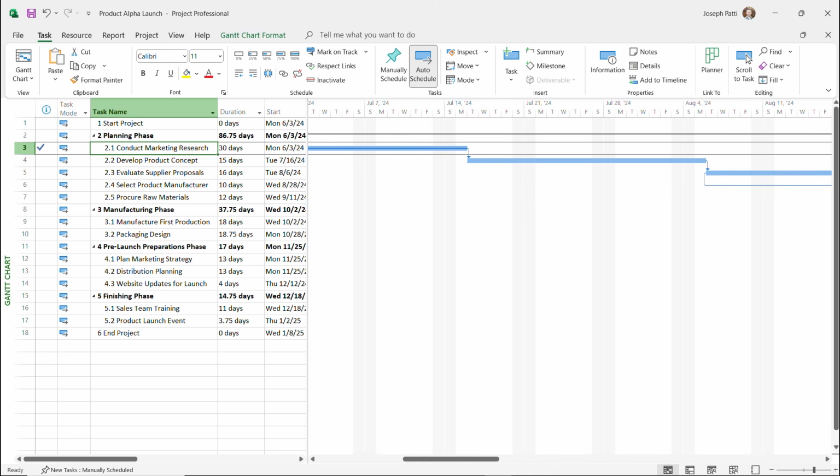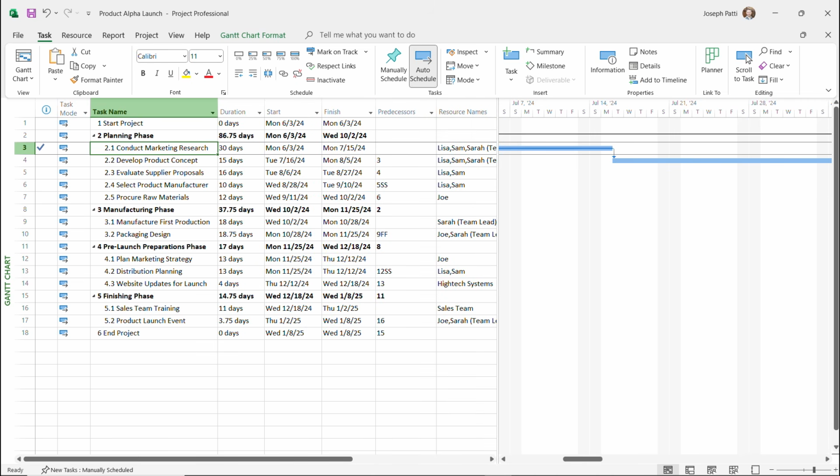But let's say we did get a little bit completed on 2.2 task. So I'll just move this back over, click on 2.2 task, and let's say we're about 50% done with this one. Now, once again, we don't have a way of telling if it's 100% unless we see that check mark only. There's no indicator as to what percentage completed this is, and the only indication is a visual one over here on our Gantt, where we see the solidified bar going through halfway. So we're at 50%. Now that's all going to change once we talk about a next topic, which is the tracking table, where we can then see those percentages.